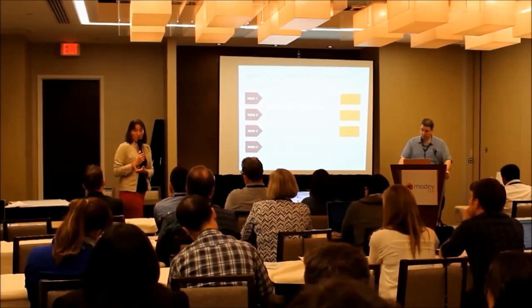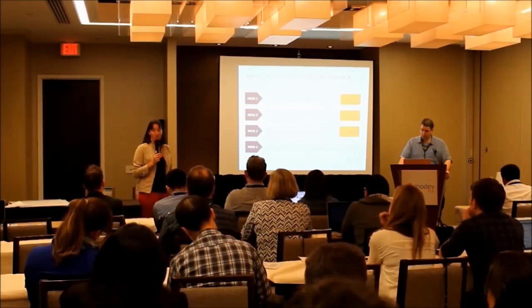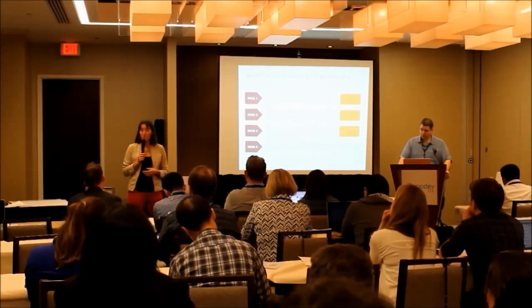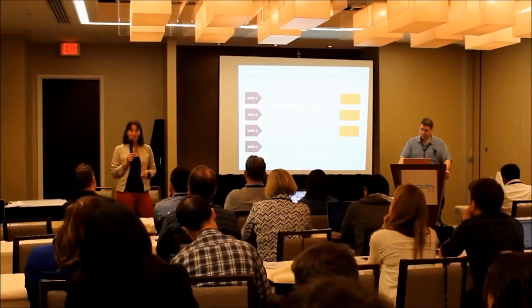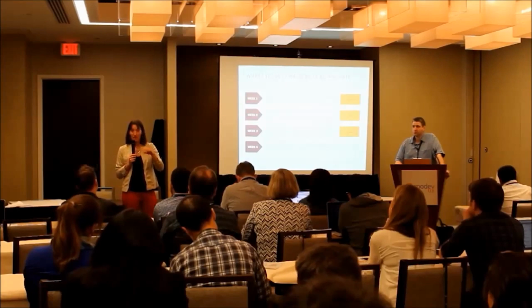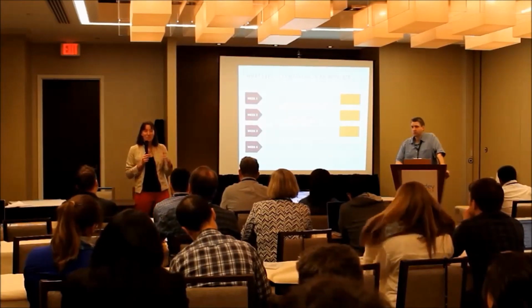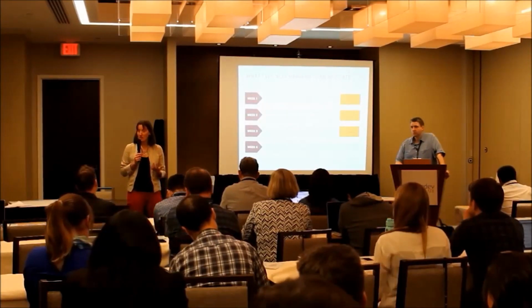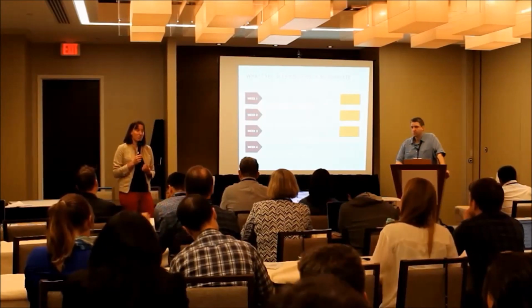So if we wanted to do something more complex, then this would change substantially. We'd probably go into 2 weeks. Depending on the type of feature, we might have to go to a staggered sprint approach, where we're doing design up front and then testing. It really depends upon the complexity that you're trying to work with.